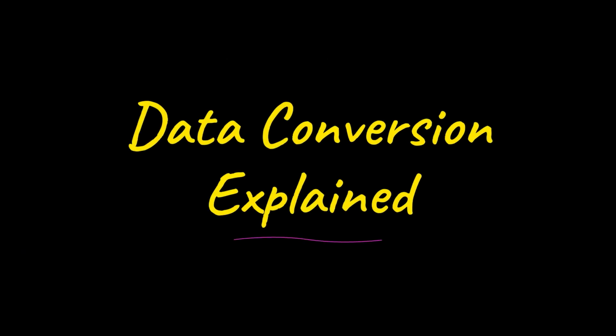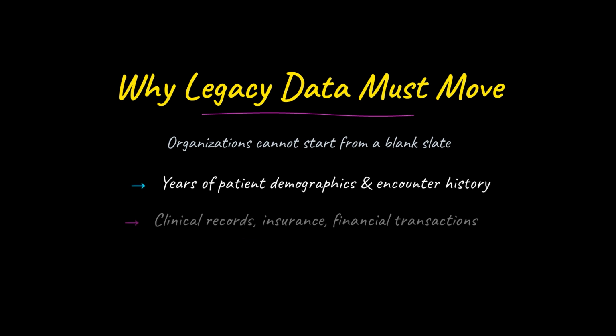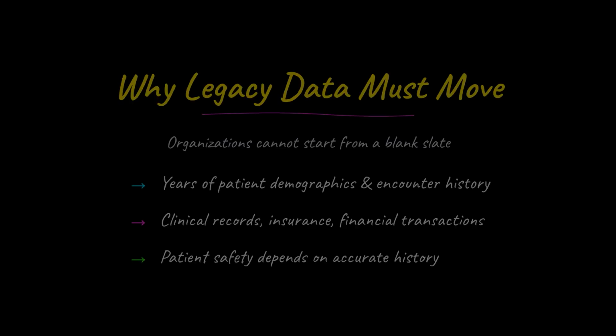Data conversion is the process of migrating historical data from a legacy system into a new information system, restructuring it to fit the new data model along the way. It is consistently one of the highest risk activities in any healthcare IT implementation. Healthcare organizations carry decades of critical records in their legacy systems. Leaving that history behind would force clinicians to reconstruct patient context on the fly. It's an unacceptable risk to patient safety and continuity of care.